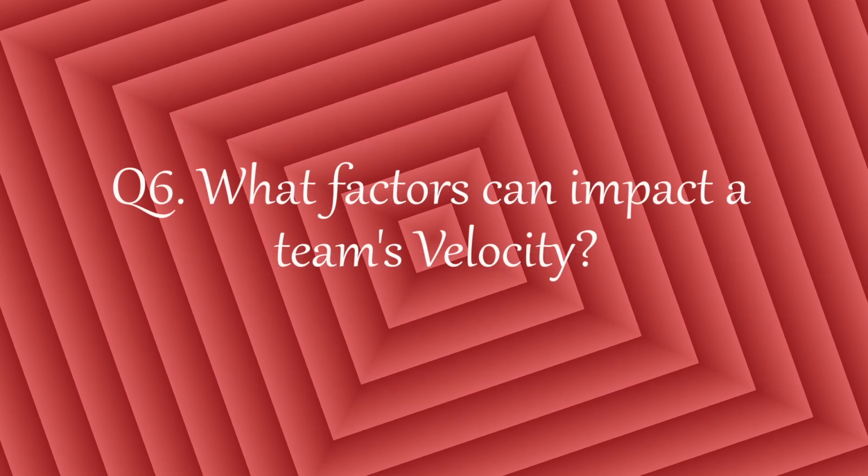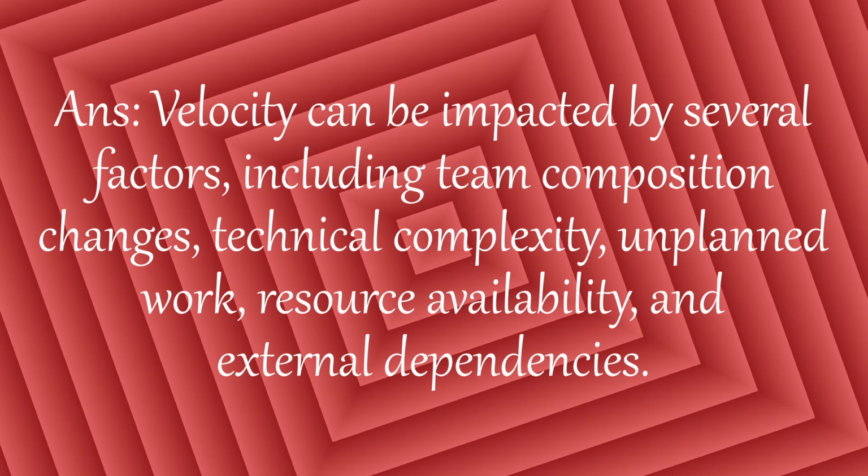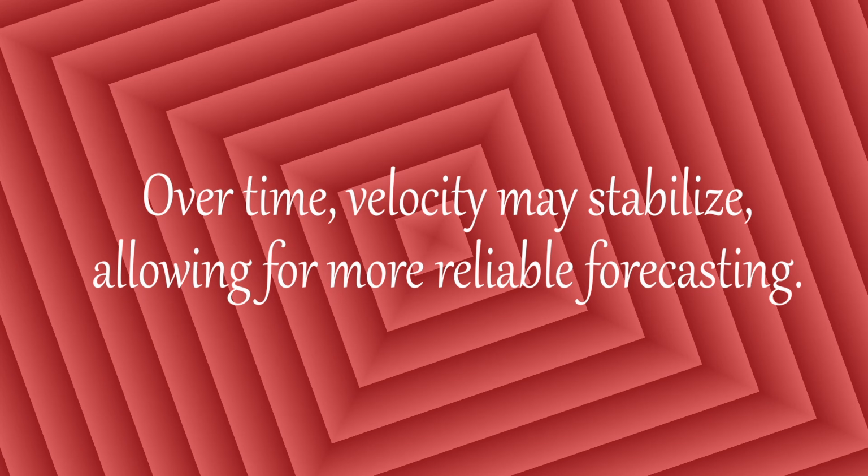Q6. What factors can impact a team's velocity? Answer. Velocity can be impacted by several factors, including team composition changes, technical complexity, unplanned work, resource availability, and external dependencies. Over time, velocity may stabilize, allowing for more reliable forecasting.